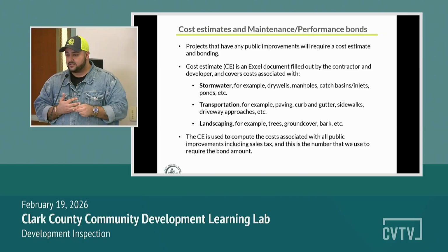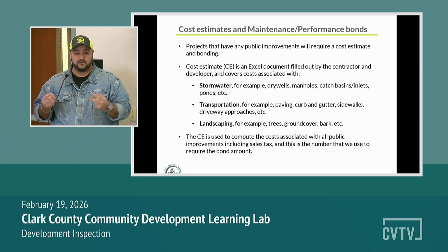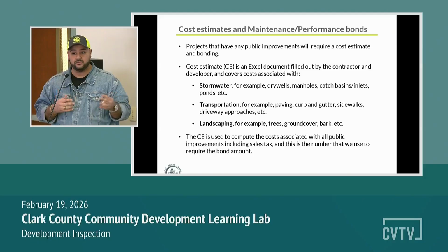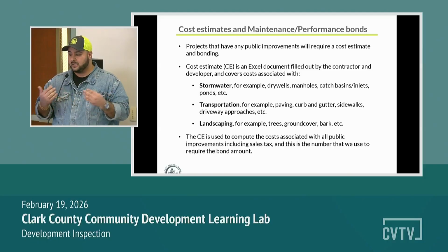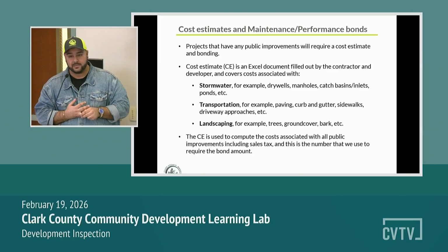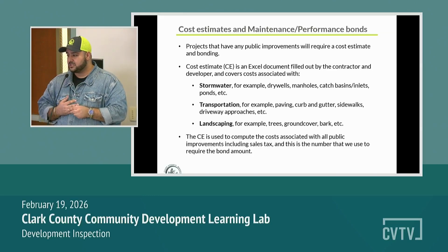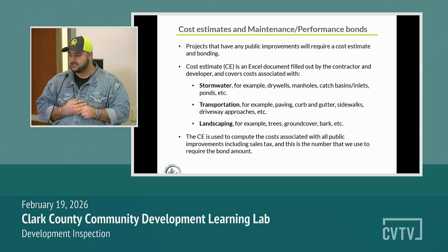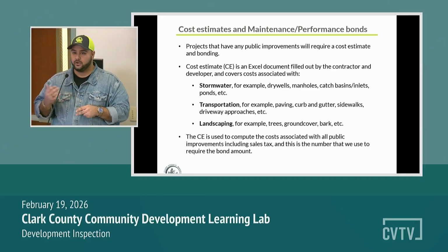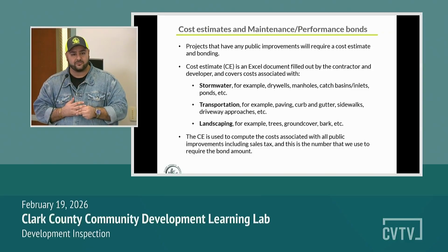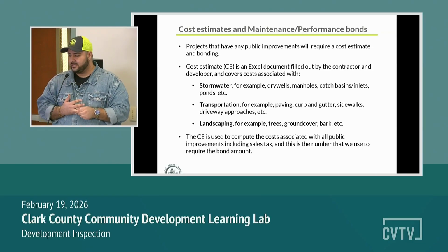The cost estimate we send you, you'll get a copy from the beginning. If not, I'm more than happy to forward you an Excel sheet of what we use. It's comprised of multiple cells. A lot of it is, we're just going to review the stormwater, the transportation, and the landscaping. Some of those examples is just the cost associated with the dry wells, manholes, catch basins, and inlets. Anything that has to do with paving, curb, even landscaping sometimes, gutters, sidewalks, driveway approaches, and then trees, ground cover,